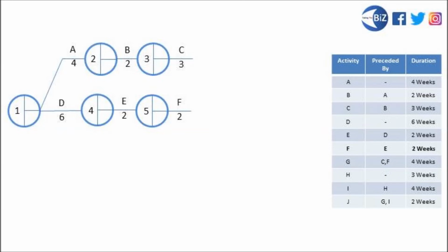So you can see we've got 2 branches now that shows that A and D can both begin right away, but B can't begin until A is finished, and C can't begin until B is finished, and then the same along that middle row. D begins straight away, but E is reliant on D having finished first, and F is reliant on E having finished.